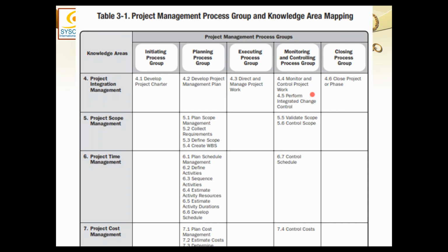Basically, what PMI does not talk about is the project board. Project board might be a body outside of the project of senior executives or the key stakeholders. All the change requests are actually taken to the project board and they approve or reject the change request.